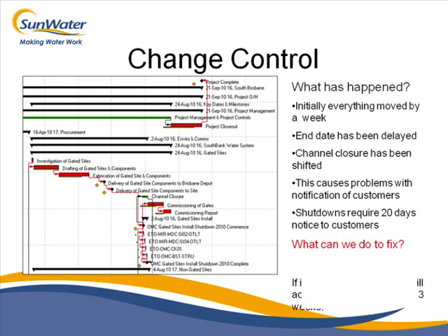let it happen. So as I said, if this is delayed a week, and because of the notification, it may actually blow out this date, it might blow out to like another 3 weeks because of that. You've got to give customers that time to know that the water's being shut off and so forth. So they need to take measures.